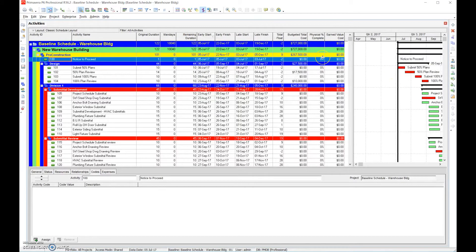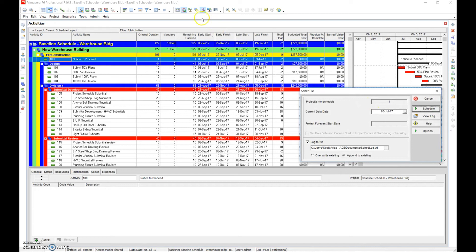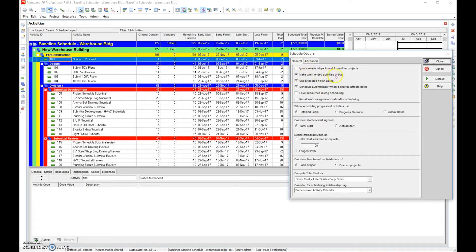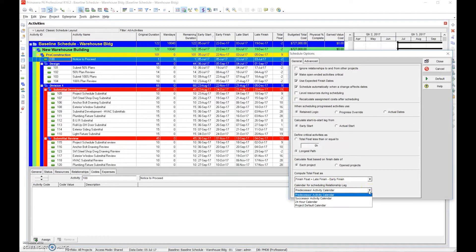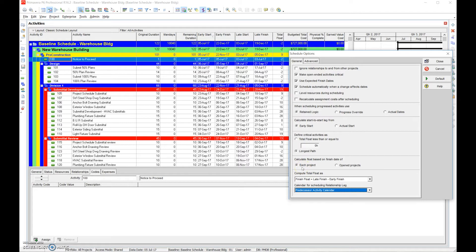Now that we have that done, we're going to look at the scheduling options. Simply click on the clock with the play button, go to Options. We want to make sure we make any open-end logic critical, use the expected finish, schedule automatically when changes affect, retain logic, calculate start-to-start from early start, set it to the longest path, compute finish float as late finish minus early finish, and use predecessor activity calendar for scheduling relationship lags. Make sure we calculate full float based on each project.